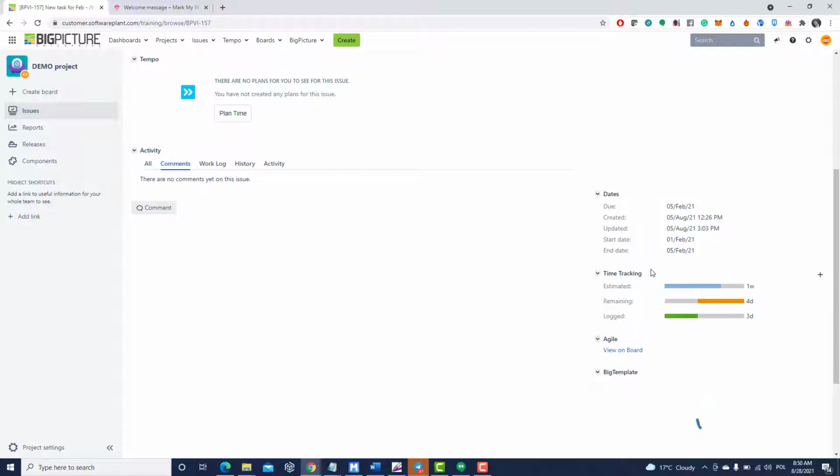So the time tracking in Jira environment allows you to, first of all, estimate your task with the field called original estimate, then also put a value into the field called the remaining estimate, and if you don't, it will automatically be copied from the original estimate, and then log work on the task so that you can, first of all, track the amount of time that has been spent to complete the task, and also see how your original estimate worked out in the end, whether the task was overestimated or maybe underestimated or just estimated perfectly, right?